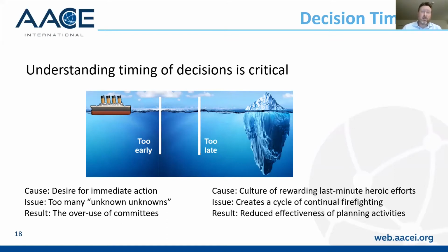And businesses that sort of run on that too late, that's usually driven from a culture of rewarding that last minute heroic effort. The issue is that it creates a continual firefighting environment. And what really happens is that you're reducing the effectiveness of planning activities. So especially in complex situations, you need to be aware of when you're making decisions.